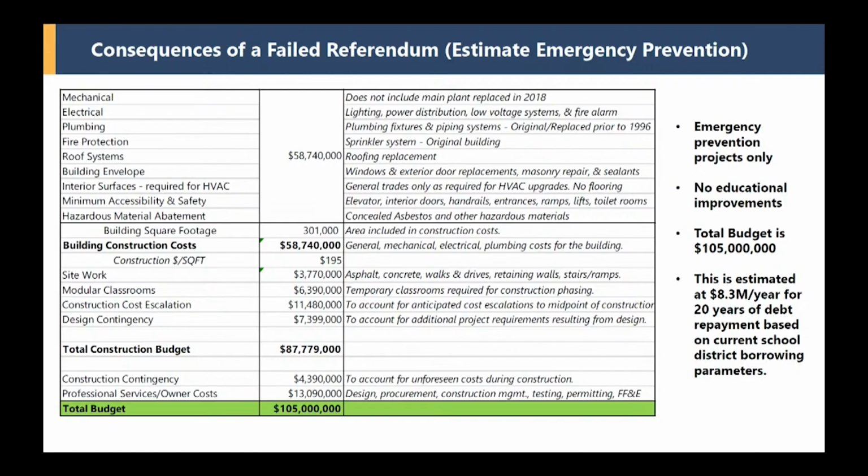But there is a lot of existing things that are not up to current ADA code, for example, some of your stairwells, things that we would not be touching. We would work with the authority having jurisdiction to ensure that we could leave those as is. They are grandfathered into whatever code they were built under. So the number would be much larger if we did have to bring everything up to current code.